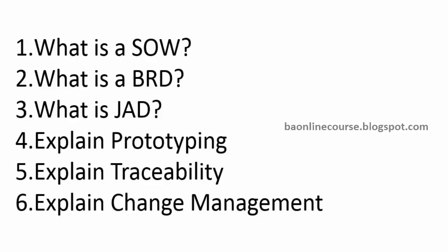And change management. It's when the client asks for a change in any of their requirements. Then the client needs to submit the change request form to the BA, and the BA will put it in a document and put it in front of the management, and they will decide and approve whether it is feasible or not. And that's how change management works.